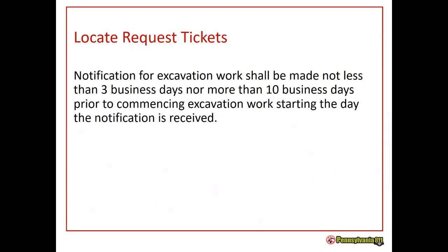Prior to starting, you want to make sure you're surveying your work area, matching up the responses to see or match what you are seeing on the ground. If they do not match, call back to 811. They will put out a re-notification for you to notify the facility owner of your concerns.